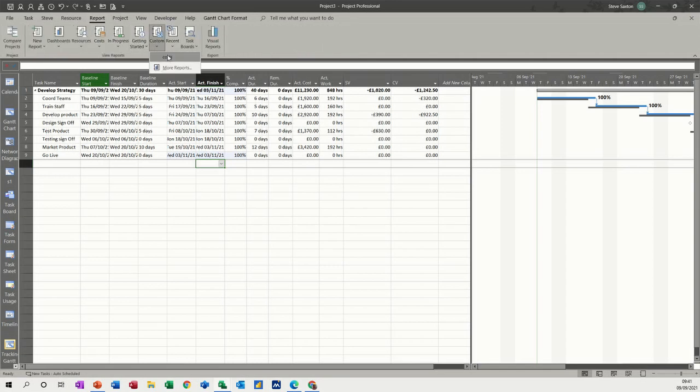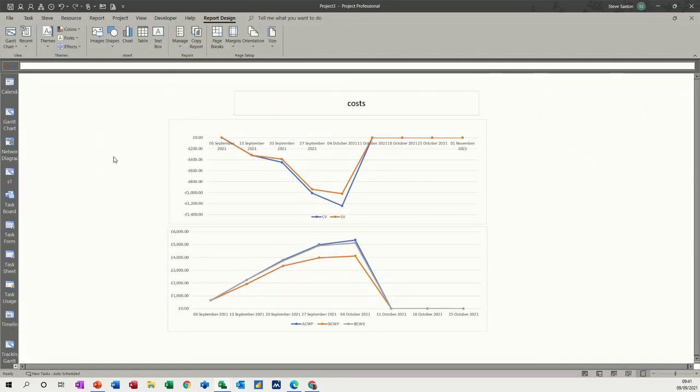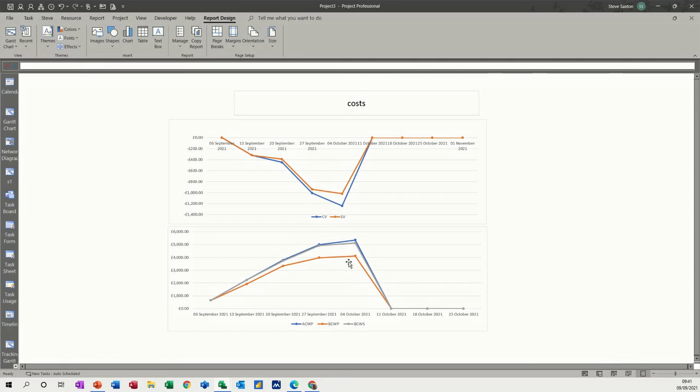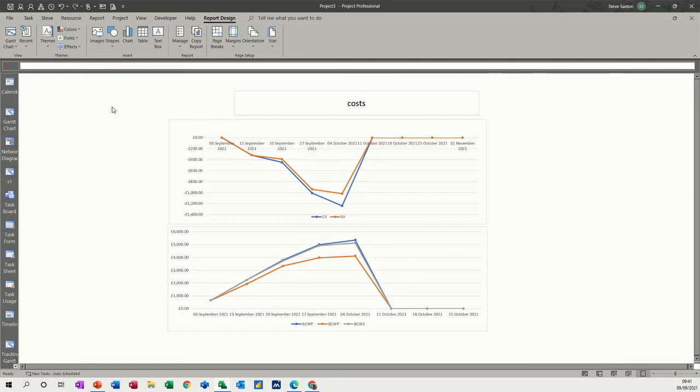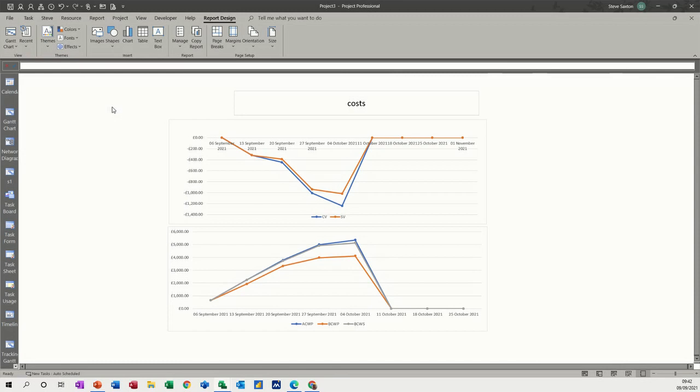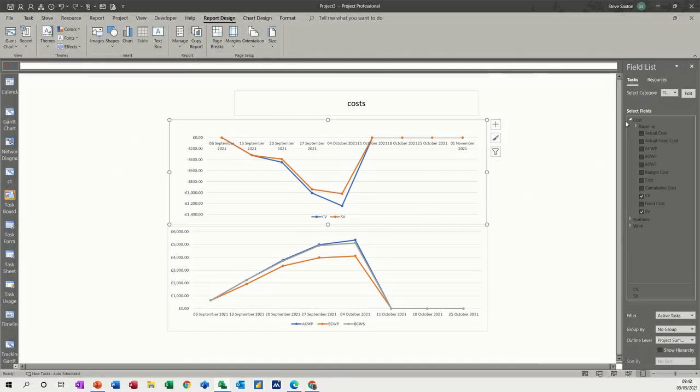Let's have a look at the report - Custom Costs. You've got that report there. Blue is still higher than orange, so that's not great. You've got your cost variance and scheduling variance shown on there. It's just a tool that you can use to monitor how you're supposed to be going on your project. For example, if you've got a 10-month project building houses, you're supposed to build one house a month, but you find after the second month that you've only built one and you should have built two. You're only 50% of what you should have been at the status date.